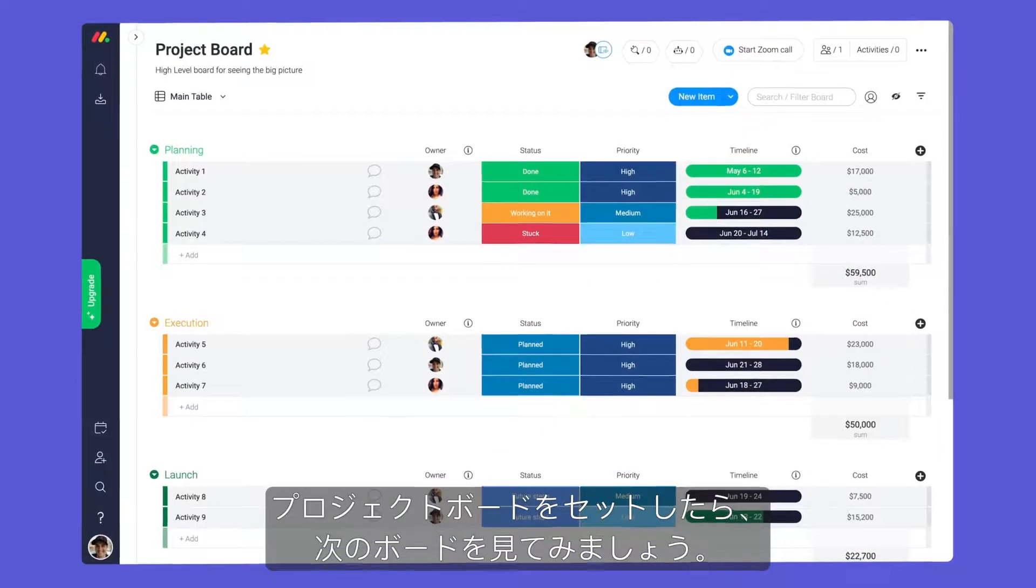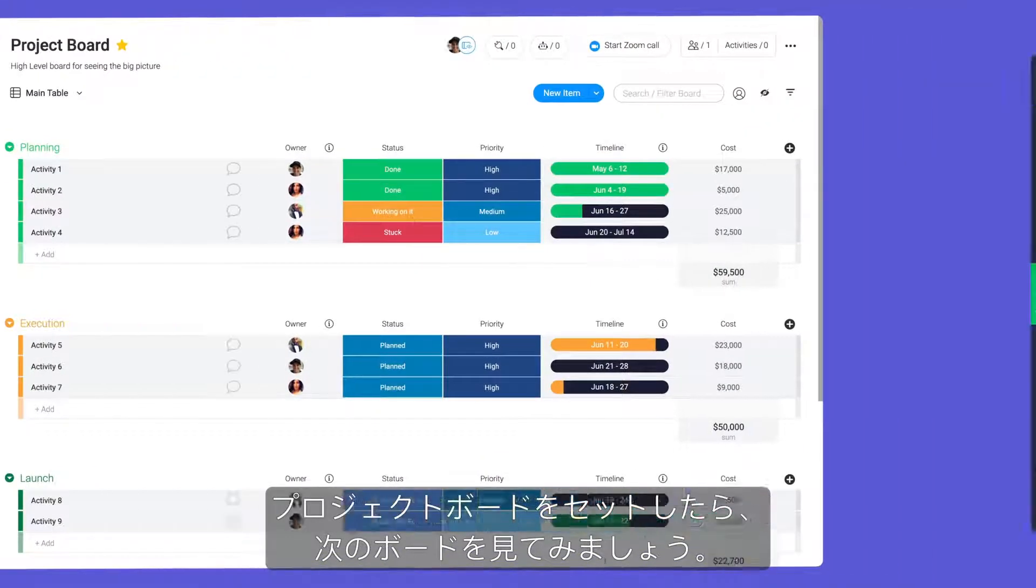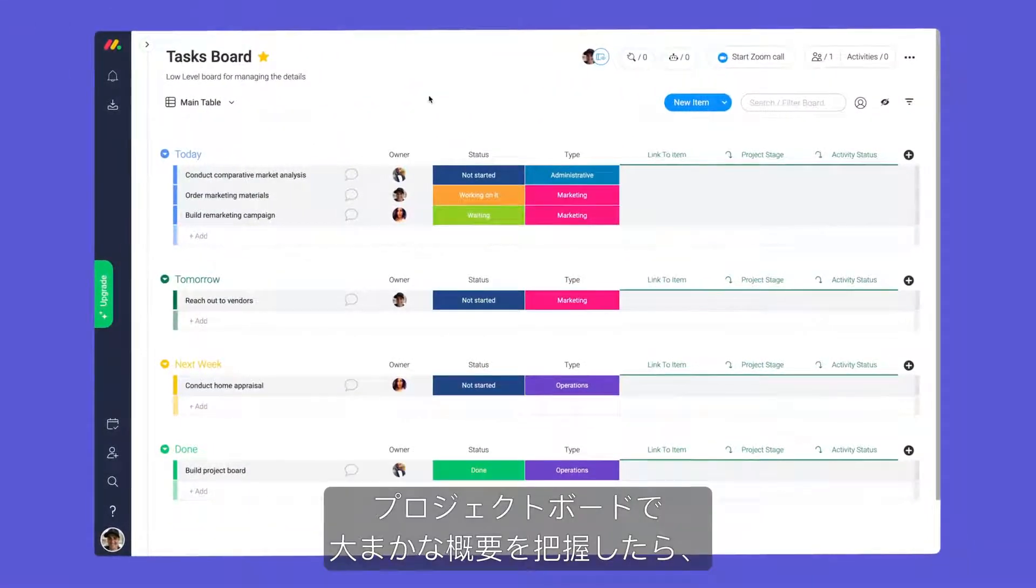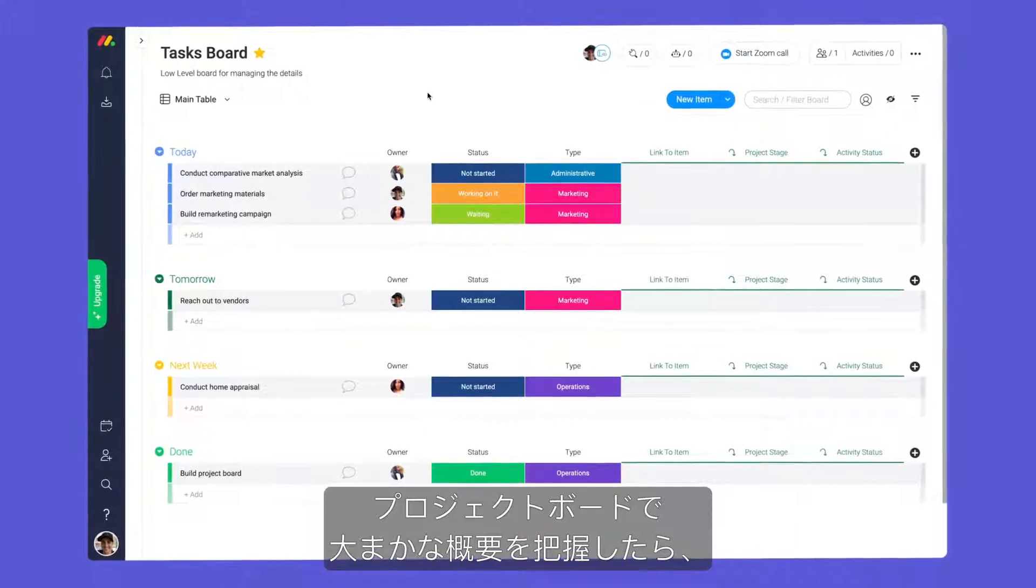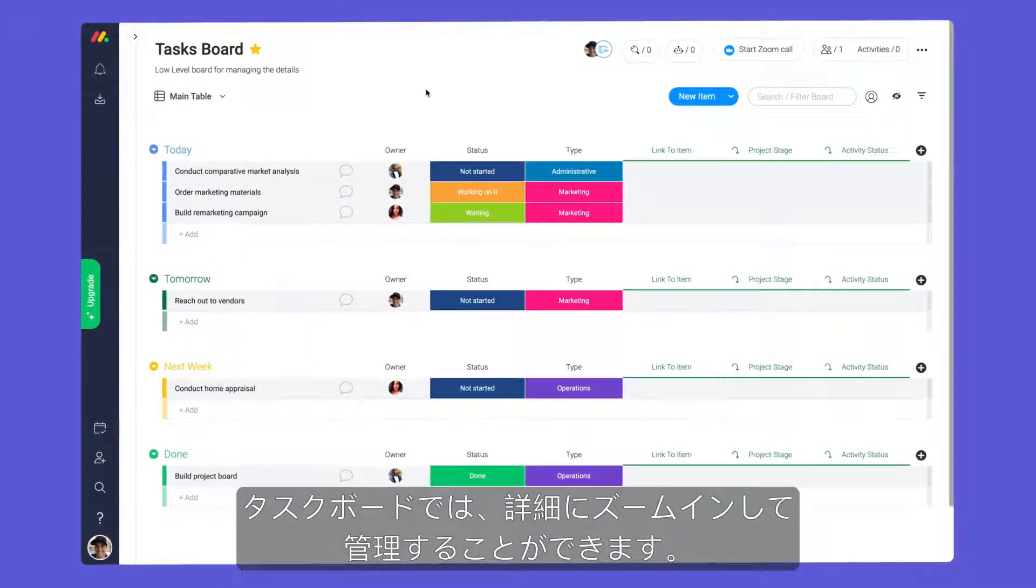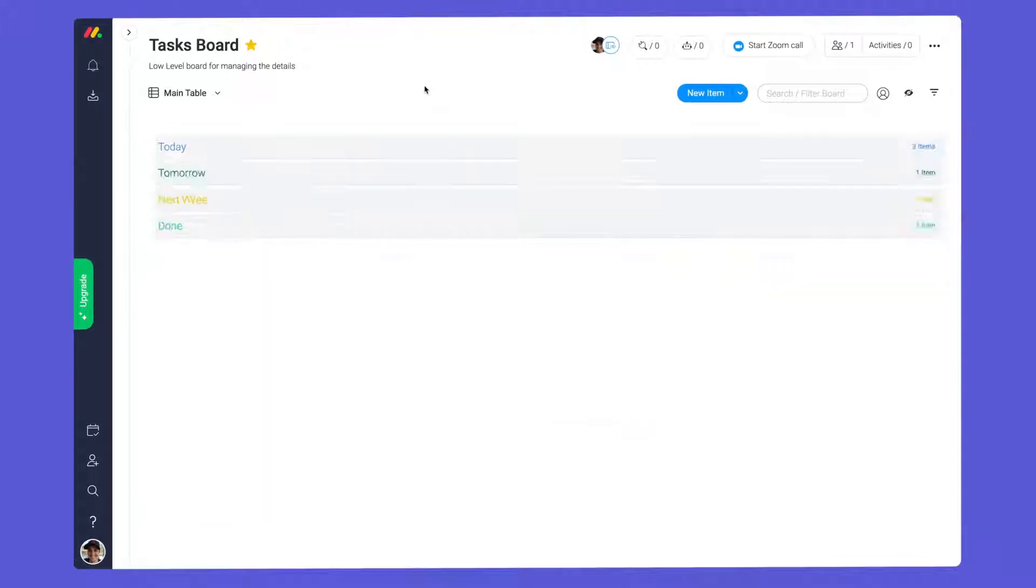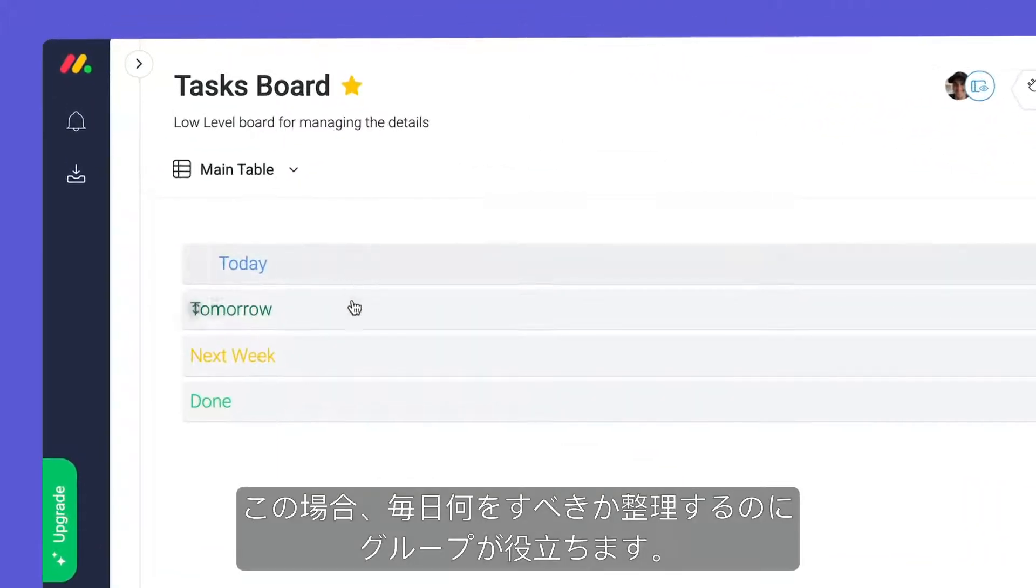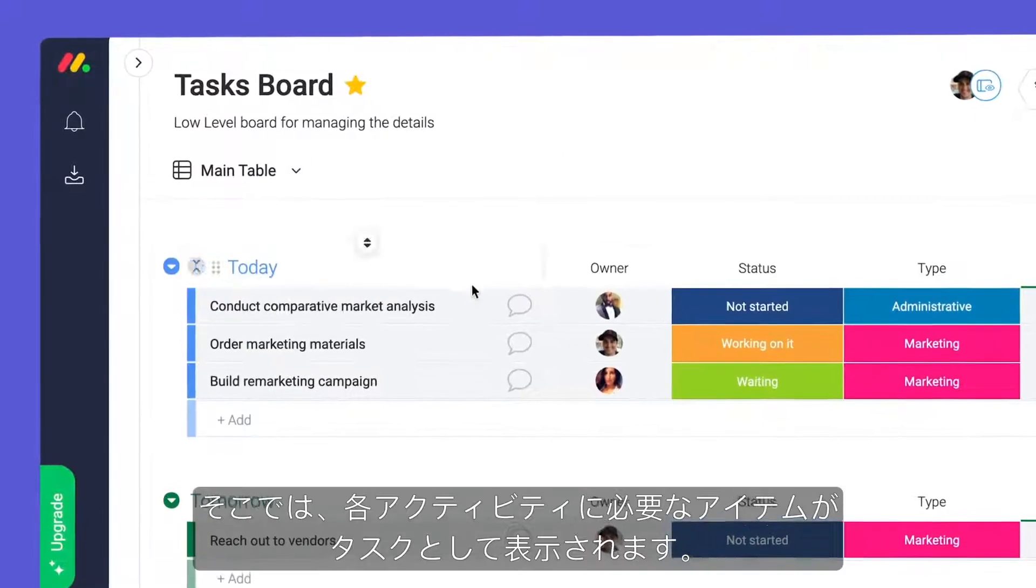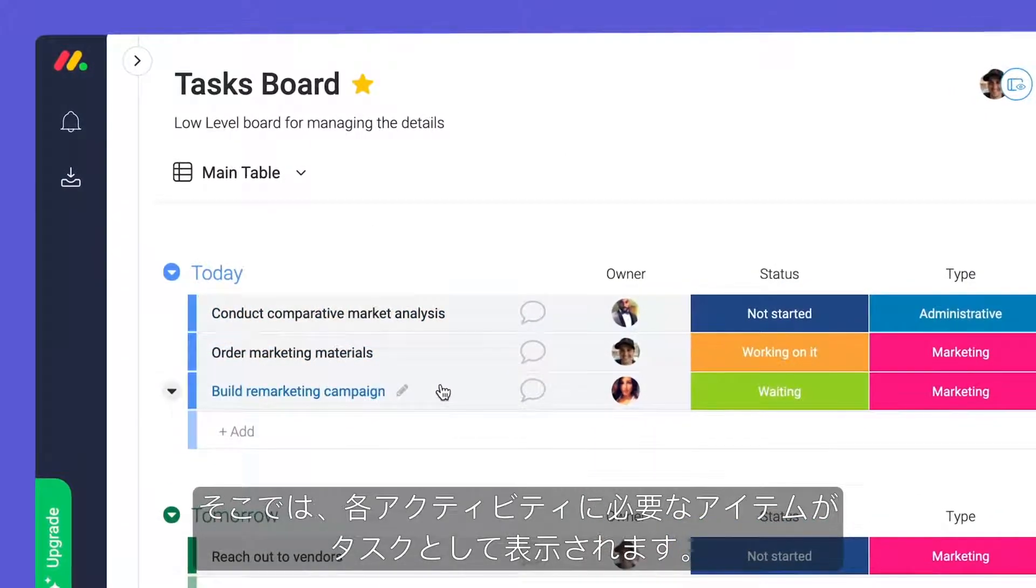With our project board set, let's take a look at our next board. While the project board provides a high-level overview, this task board allows us to zoom in and manage the details. In this case, groups help us organize what will be done each day, while items represent the tasks needed for each activity.